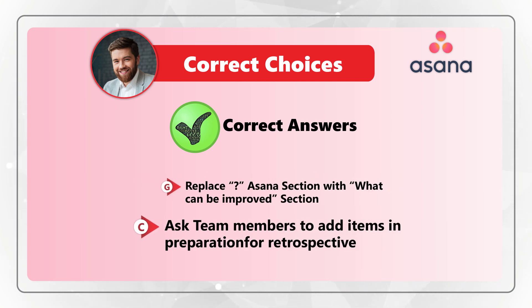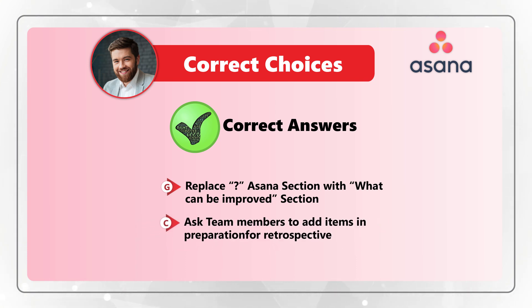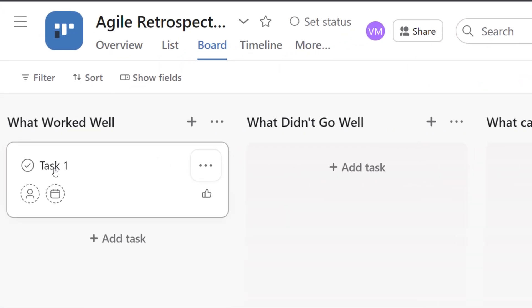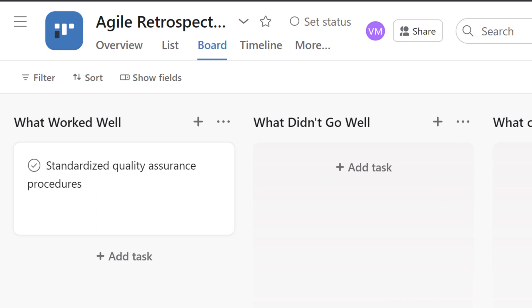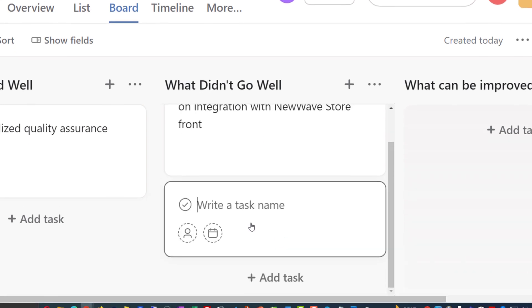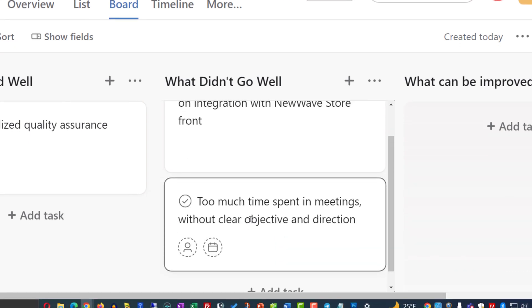The second answer, choice C, is that we also need to ask team members to add items in preparation for retrospective. Each team member will have access to the board and will be able to enter items in each category. For example, in the 'what worked well' category, a team member can enter 'standardized quality assurance procedures.' In 'what didn't work well,' you might see entries like 'it took too long to make a decision on integration with new wave storefront.'